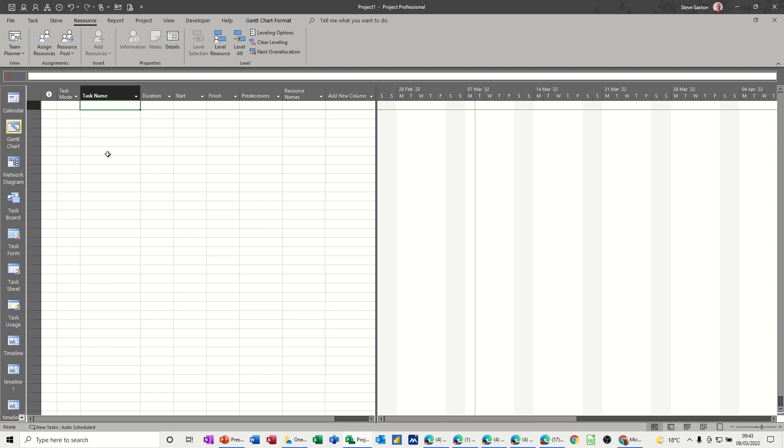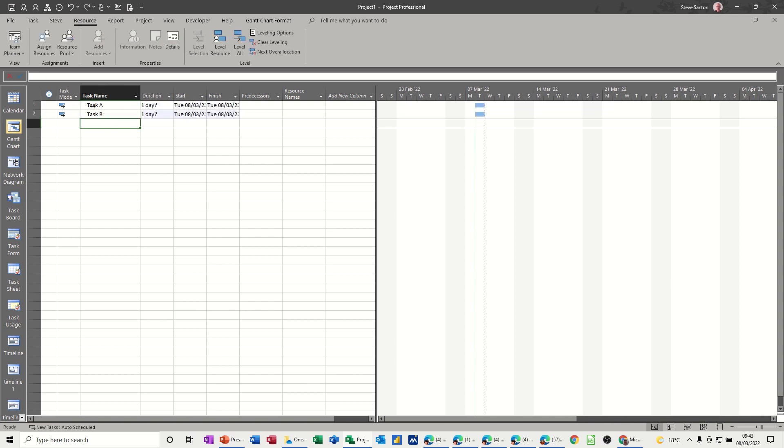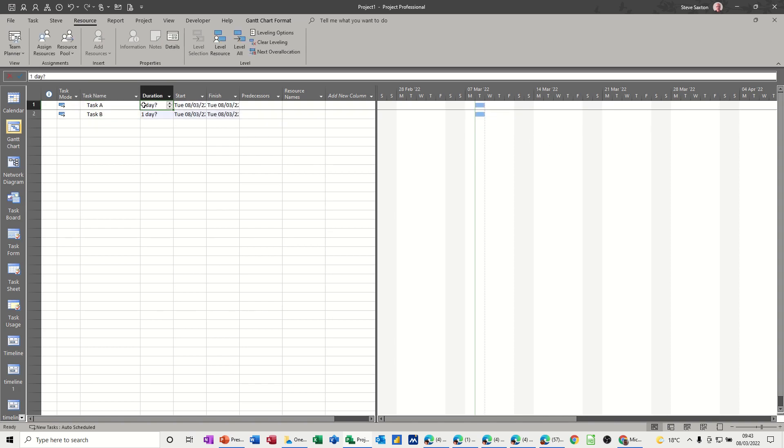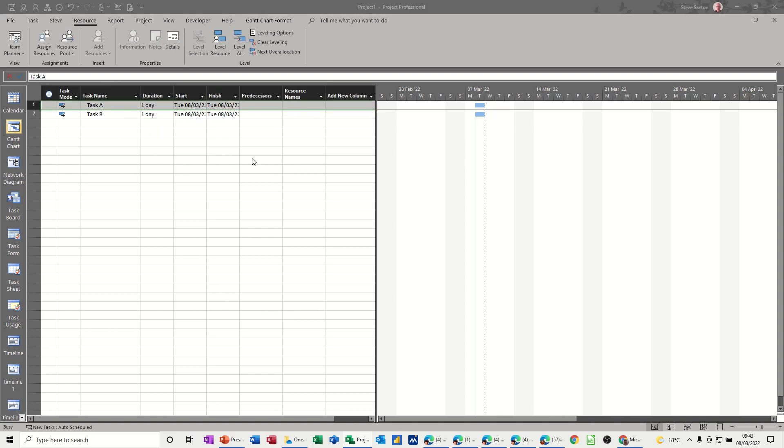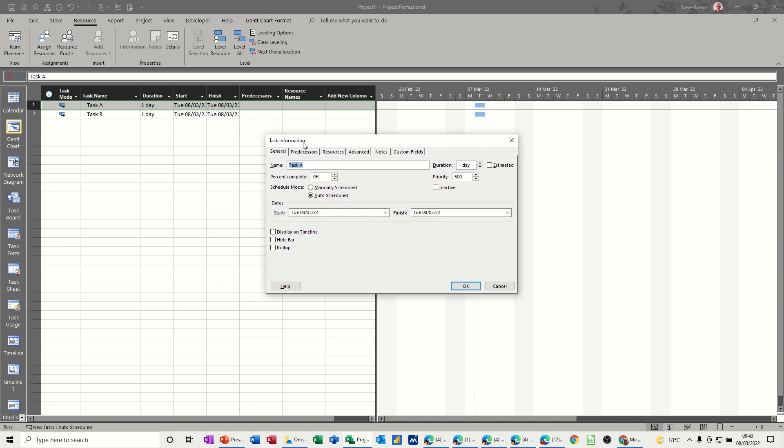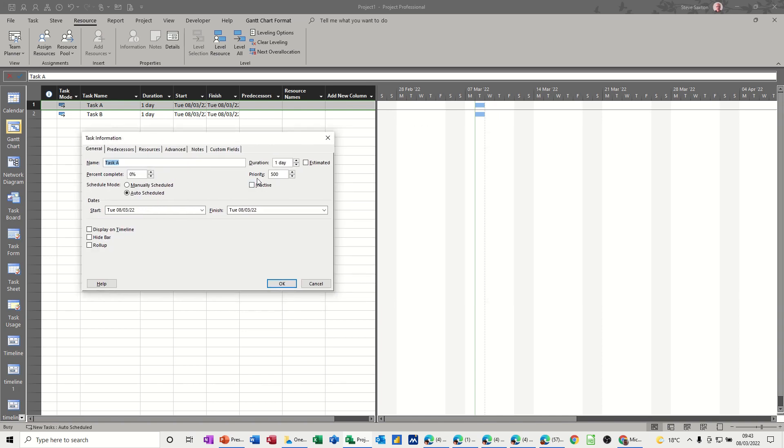So what I'm going to do is create a couple of tasks and then have a look at the priorities and see how they work. So if I just do task A and task B, if I make these both one-day durations and double-click onto task A, by default when you create a task, the priority is set at 500.